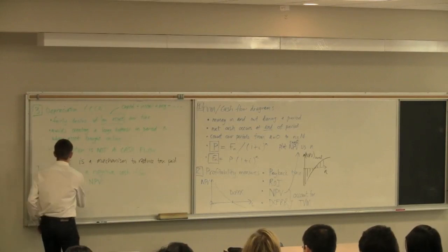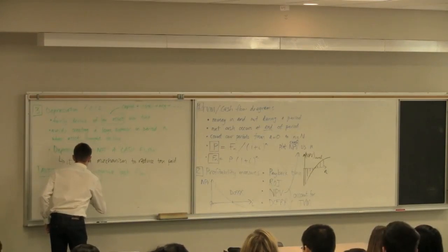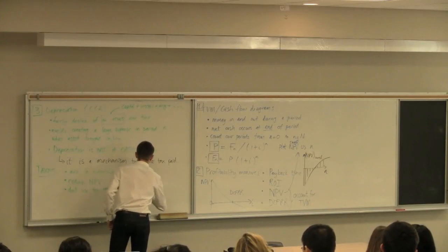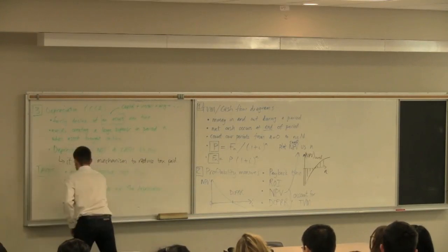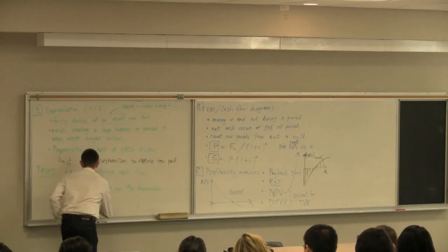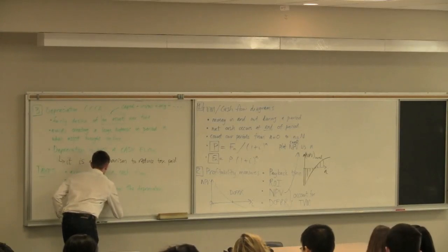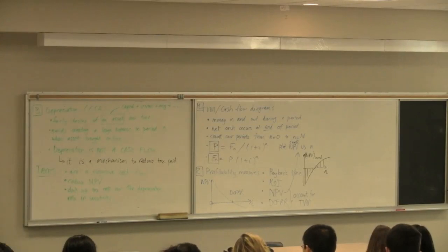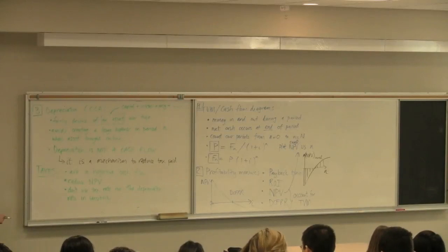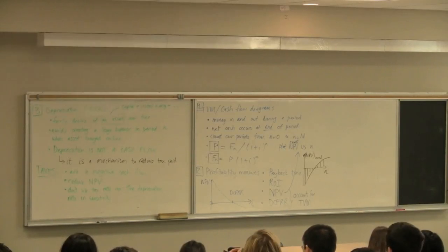And I'll just make a note here that we generally don't use the tax rate nor the depreciation rate in a sensitivity analysis. I had some people ask me about that by email after a class. Don't use the tax rate nor the depreciation rate in sensitivity analysis. The main reason is that neither of those two factors are uncertain. The sensitivity analysis, which was the part we looked at the last class, is really to investigate the effect of uncertainty of certain variables. The main ones being things like sales volumes, cost of raw materials. Those terms are certainly some of the most uncertain.